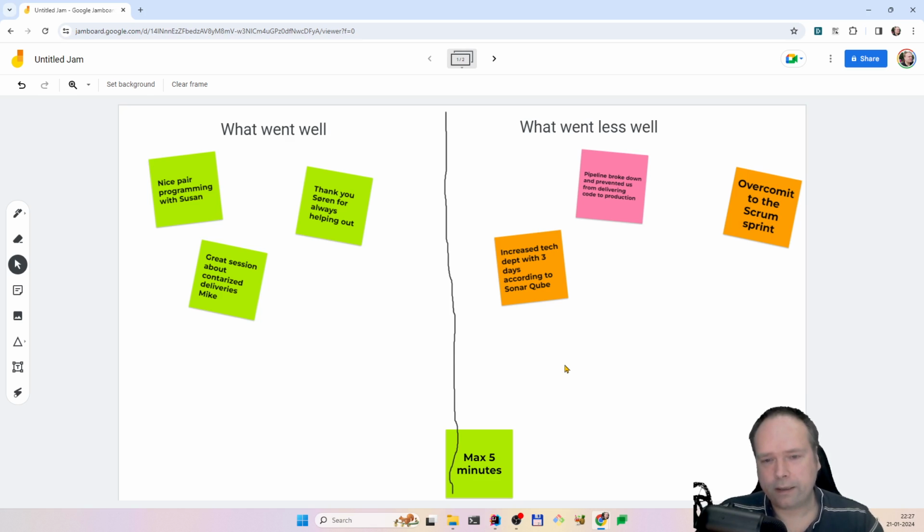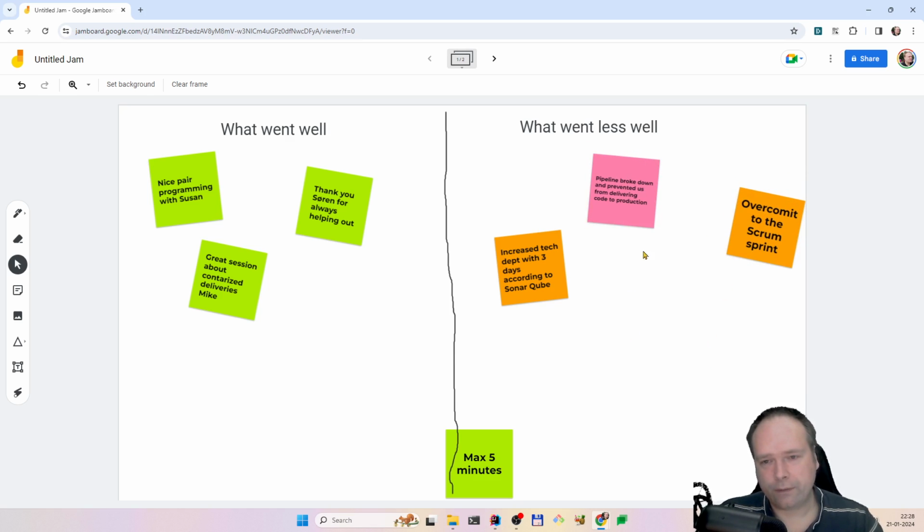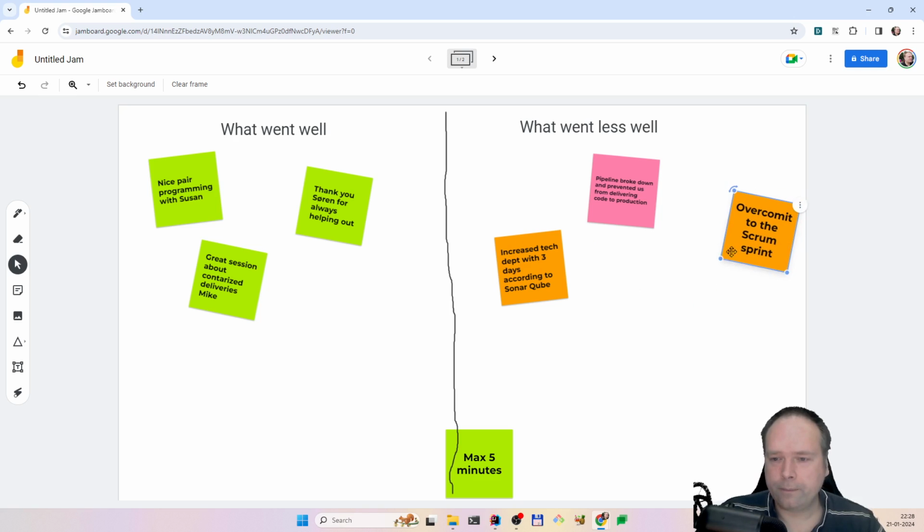Sometimes you say that it's okay that they place it on the same problem. That means that they can actually place all 3 votes on the same problem. The point here is that there needs to be a limited amount of votes, and that's actually it. So then everybody goes, and then they say, okay, I want to put one.